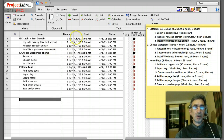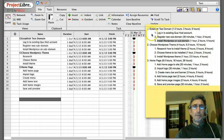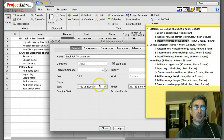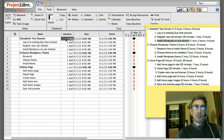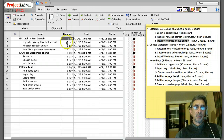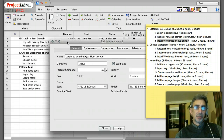Now I've got all three milestones and their sub-items. For the sake of this demo I'm going to use his worst-case estimates — that's not a bad idea because you can see worst-case how far out the schedule goes. In the duration field here, I double-click, but notice I can't enter a value directly into the milestone — it wants to total the durations from the items below it.